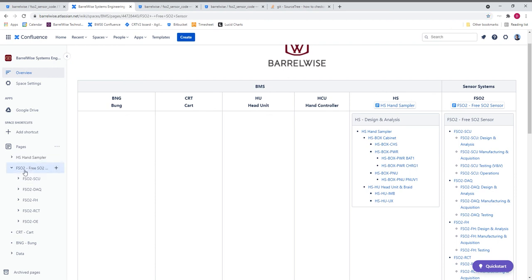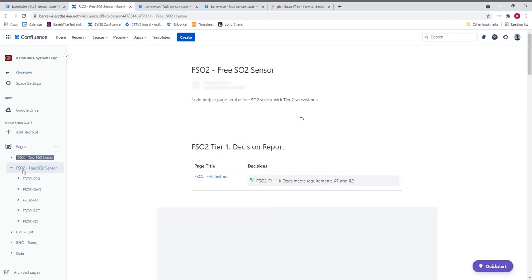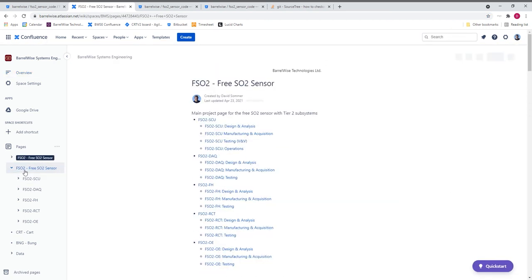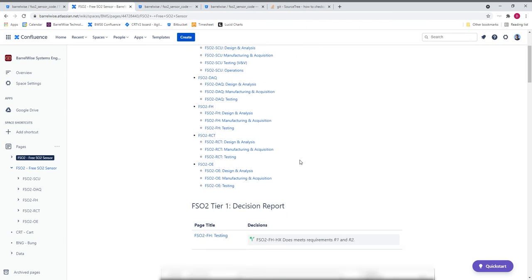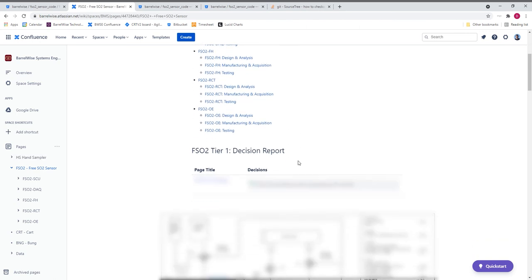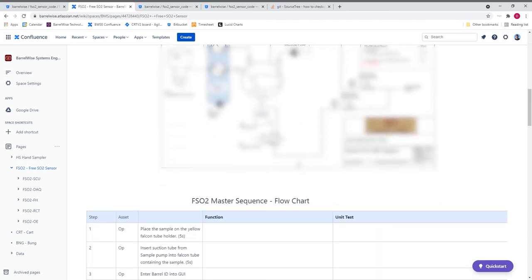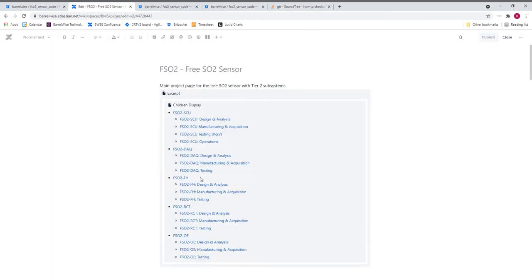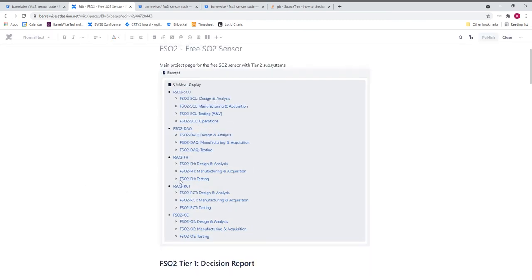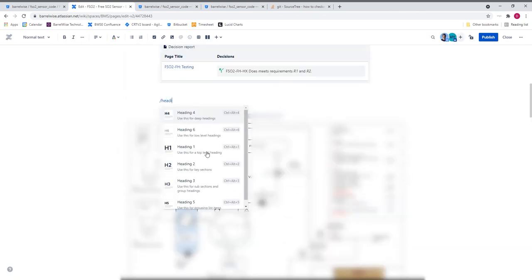The choice of which tier level page we want to use to document our work on is a balance between getting as much specificity and focus as possible, while minimizing the splitting of tightly integrated interfaces across different distinct branches of the product breakdown structure. This balance might change throughout the design lifecycle. In this case, since this test function is for integration testing between the FreeSulfur sensor control unit subsystem and the FreeSulfur data acquisition subsystems, I'll need to put it at this tier 1 level.